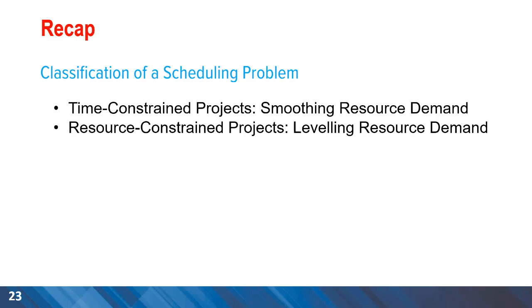So to recap, we classify scheduling problems into two categories: time constraint projects and resource constraint projects. Smoothing resource demand is a comparatively easy problem to solve because we don't want to delay project completion. For resource leveling, we have a hard constraint on availability of resources and as a result we need to use priority rules to extend the project duration and meet the available threshold for resources. Thank you for your attention and I look forward to having future discussions.